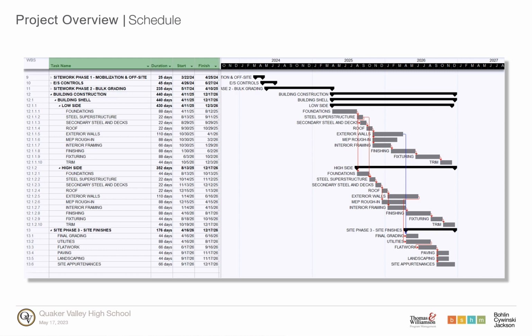The timeline that is shown on this slide is my first draft of the construction schedule. I have outlined the overall logic and have included the time required to implement the construction. Overall, the construction is scheduled to span the period from late March 2024 through late December of 2026, an overall duration of 34 months. You will note that I have assigned durations to the major categories of work. Those durations are in working days.